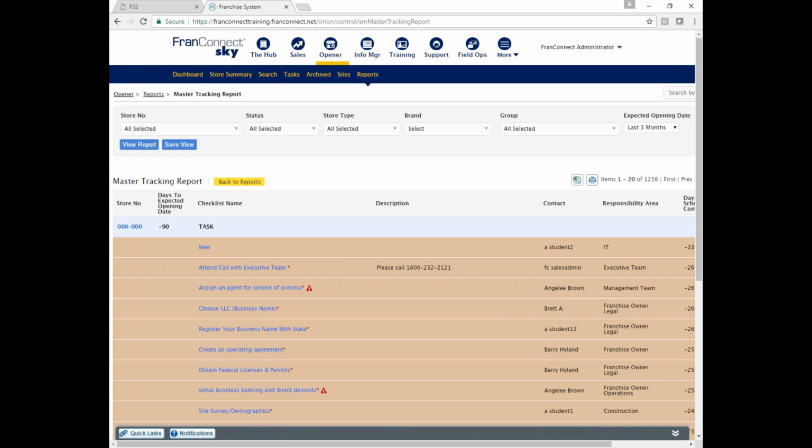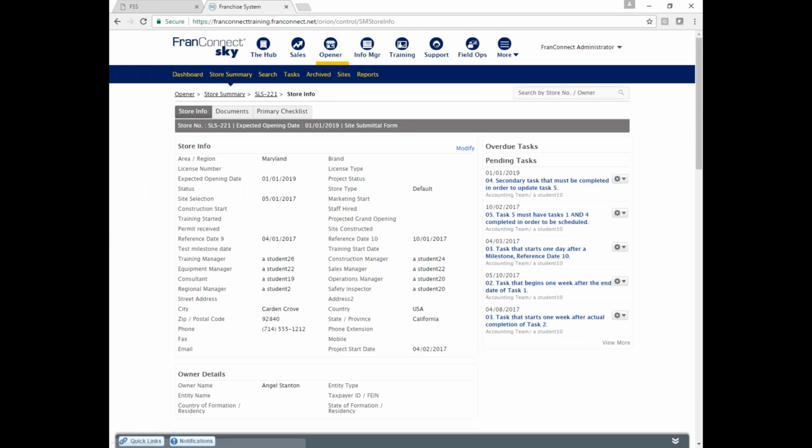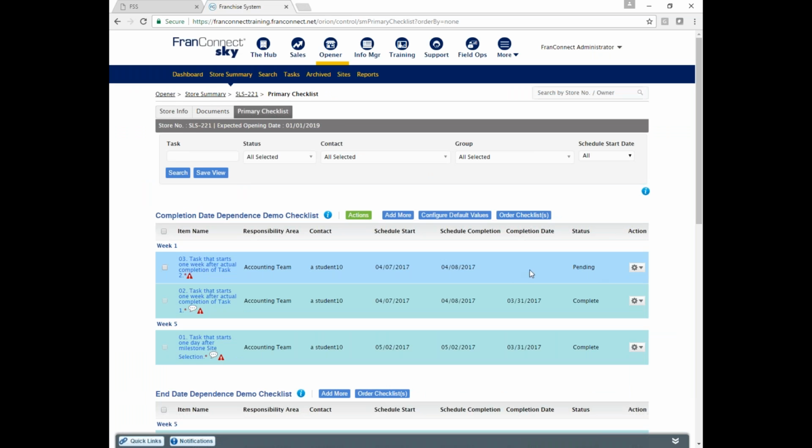All right, so email reminders of overdue tasks. I don't see a calendar dependency as an option in the drop-down listing. Right, so Christian, this one baffled me for quite some time. Here's the thing, we can only do a calendar option for something that's already underway, that's at a store, right? So we've already got some dates happening, and so when I come in here and look to make a dependency, I can make a calendar dependency on this because we have some idea what the dates are.